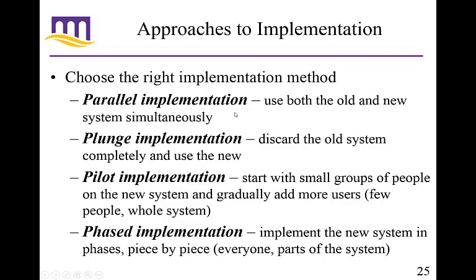But you can also do a parallel implementation where you have two systems working simultaneously. Now, recently I was involved with a pilot for Blackboard Collaborate, which is a piece of software that integrates with Blackboard, but it does a lot of the similar functionality as Saba Meeting does, what used to be called Centra. But they had both of them working in parallel. It was kind of a pilot of this new piece of software, but they were doing both of them to see which one they wanted to continue using. So it was actually a test more than anything. But sometimes you need to do a parallel implementation to make sure that both pieces work.